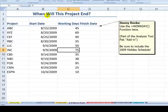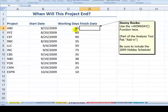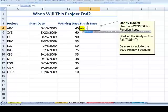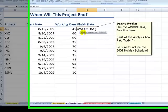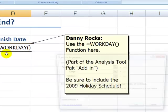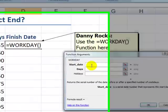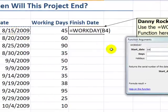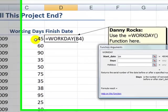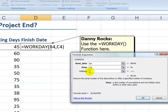When will this project end? For our WORKDAY function, we require two arguments: a start date and the number of actual working days. So let's use equals WORKDAY. In Excel 2007, we have formula autocomplete, so as I type it gives me possible functions. I'll use the Tab key, then the keyboard shortcut Ctrl-A for the function arguments dialog box. The start date is going to be cell B4. The number of days worked on the project, C4. Optionally, we can add in holidays. I haven't created a named range for holidays yet.